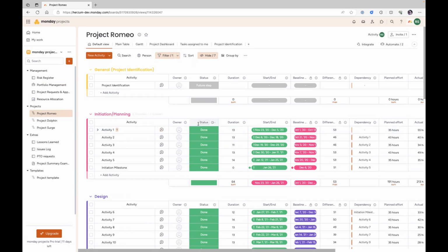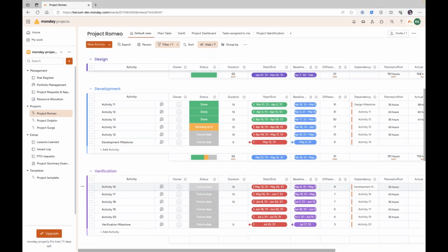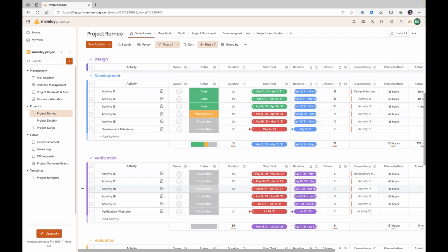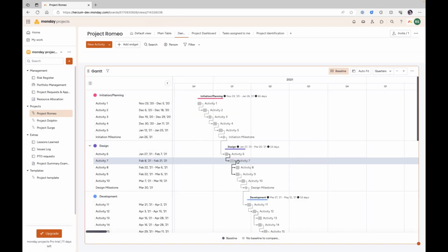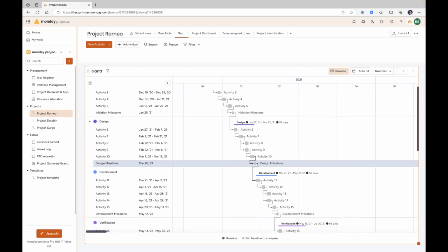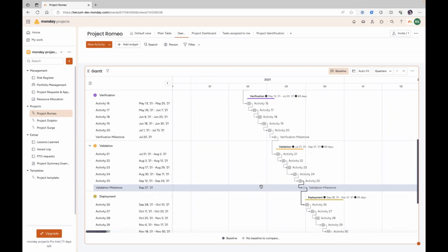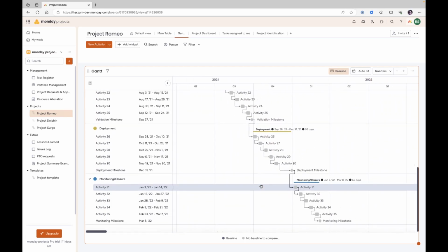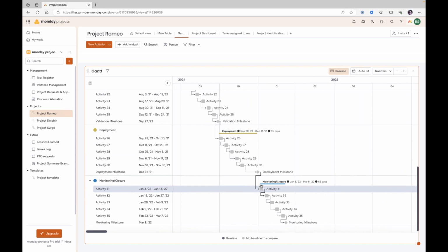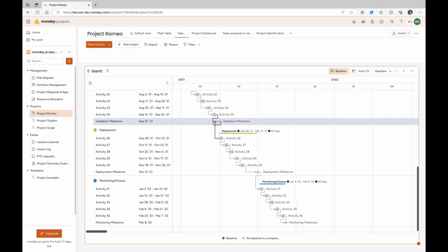And so if we go in and actually take a look at the projects, essentially all of the activities are being tracked. Anything that's planned, in design, in development, is broken down slightly differently, right? There are no sprints in this, but if you do want to apply the Agile template, you can, and you can have that as a part of your Monday project template as well. Looking at a familiar view, a Gantt view of the items, you have dependencies that you can define. You can show which item depends on which one, how they're progressing on the timeline, what goes after the other, and so on. A lot of this helps to plan and helps to understand where you are within the project at any given time.